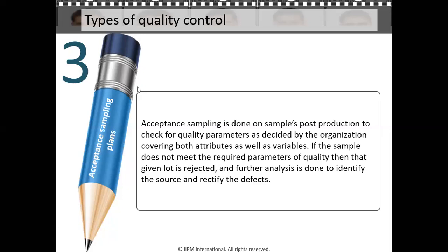So in essence, you could actually have the same project, right, but with different quality parameters. So the quality parameters in the project will determine the final or the actual project cost. That's the difference in quality cost plus the cost of producing that product. That will give you the actual product or the actual project cost. So in a case where the defined quality at the initial start is different from the delivered quality, then the stakeholder has all the legal rights to reject the project.